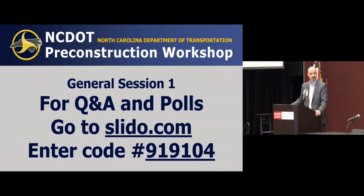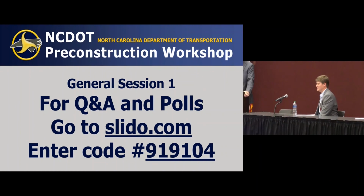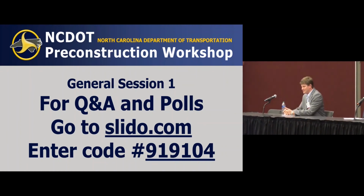All right, question. We're in the middle of a project. Does it have to follow the PDN? Anybody else want to take that? You're the panel. I'm just the moderator. I'll start. So rewinding 2 years ago when I was managing projects in Division 4, I kind of took the stance that if we were approaching final right-of-way plans, I did not think I was going to look very closely to determine, do I need to transition this project? Most of the design work had been completed. If we're somewhere in the middle of stage 2, we haven't yet signed the environmental document, we need to think harder, and there needs to be really good justification if you do not transition a project. That's kind of the approach.